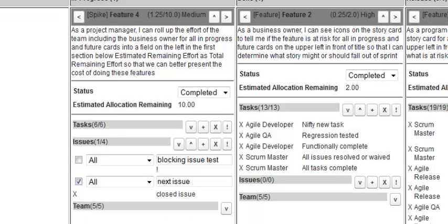When a task is noted as blocked, an issue is also created as blocked to allow you to automatically fill in the reason why a task is blocked. In addition, if you move a story backwards in progression, it automatically opens up an issue so you can put the issue why something has gone backwards in steps.